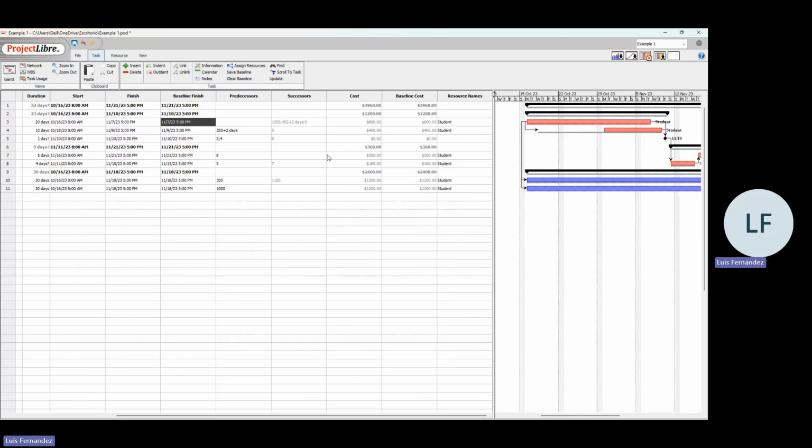So this is important to keep in mind that many people in professional life try to schedule only by the activities, by the times, but never take into consideration what happens if I add the resources with specific calendars, timing, and characteristics of the project. So as soon as I add the resources to the project, I realize those important dates are probably not what I planned, because sadly, projects are not developed automatically, or automated by the schedule that the planner is trying to complete.